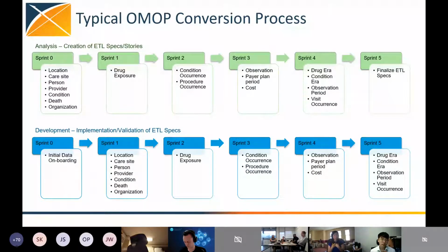What is the typical duration of a sprint? In my group, it's typically 2 weeks. I've heard of people doing 1 week, I've also heard people do 3 weeks, and I've heard people do 4 weeks. We have tried 1 week before in my group, too fast. There is very little that you can do in 1 week. Way too fast, not enough, too chaotic.